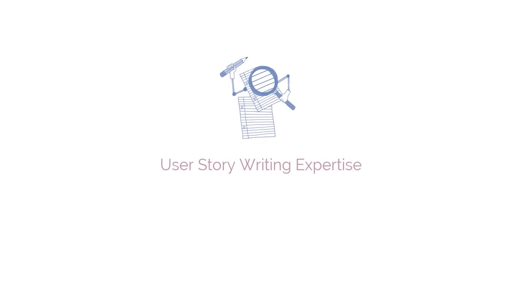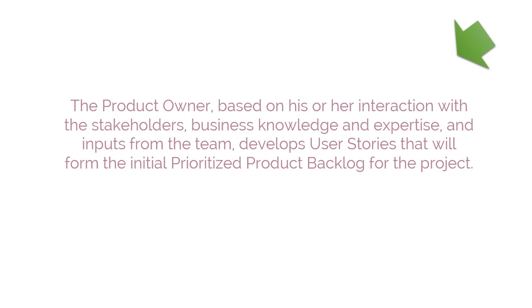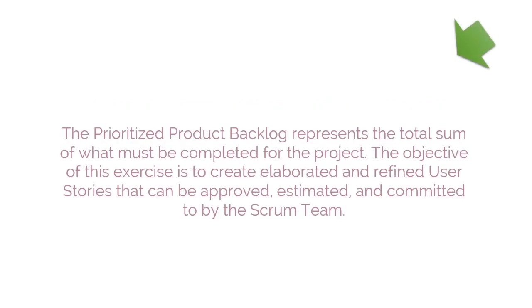The tool that must be used in this process is user story writing expertise. The product owner, based on his or her interactions with the stakeholders, business knowledge and expertise, and inputs from the team, develops user stories that will form the initial Prioritized Product Backlog for the project. The Prioritized Product Backlog represents the total sum of what must be completed for the project. The objective of this exercise is to create elaborated and refined user stories that can be approved, estimated, and committed to by the Scrum team.